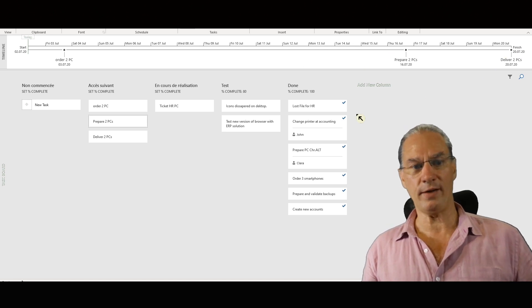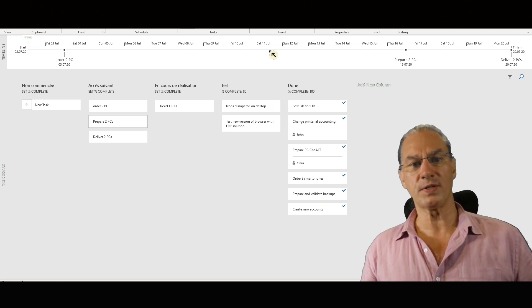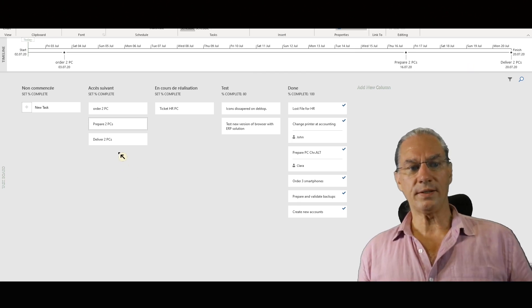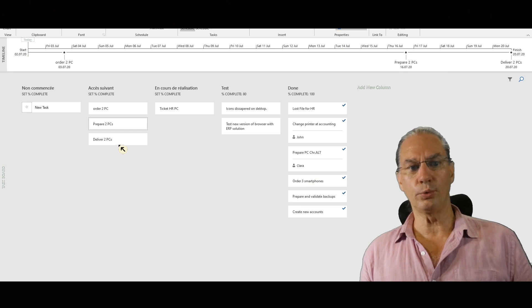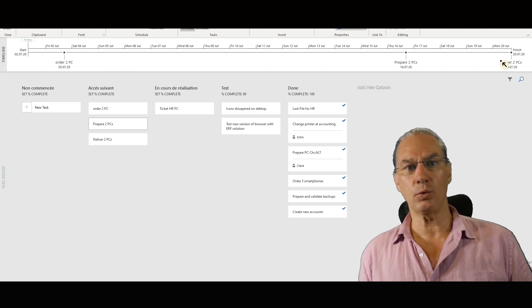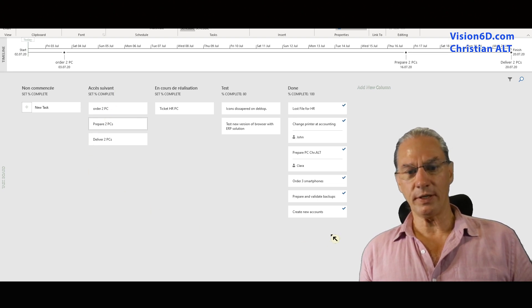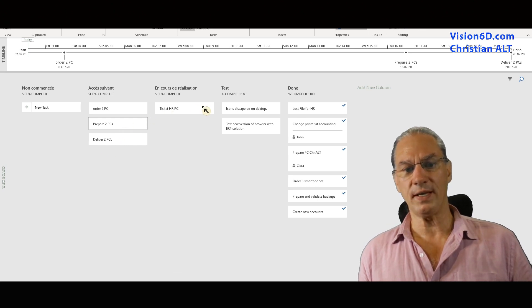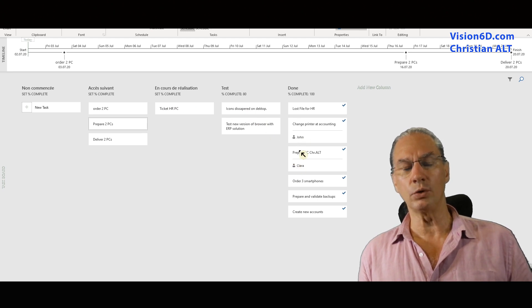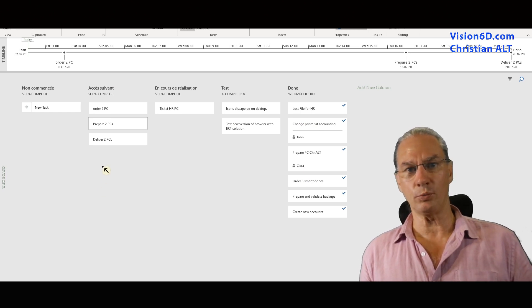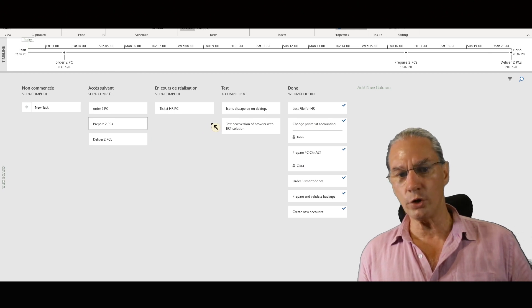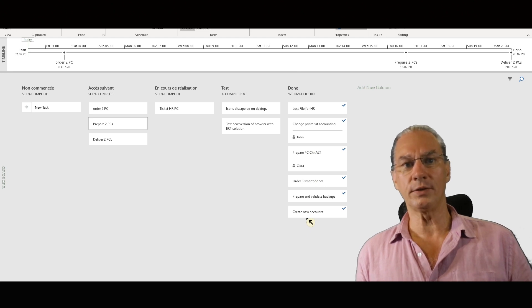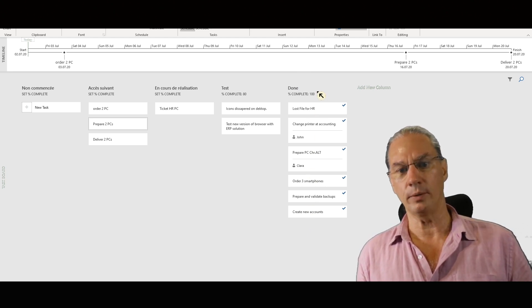With this, you have the combination of the task board plus the timeline, which shows important dates. You see that here in the example of that support group, we have a clear view of what's going on. And with the timeline, we also see the deadlines we have. The features that we find here, it's that we have really a good visibility. We know which task is on and in which state. In some cases, we even know who is doing this. And we have here a starting point from which the team commits to do the work. Then the work in progress. And here the points where the team is delivering. And it's what we call the delivery point.